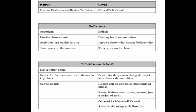So really, if you're choosing between PERT and CPM, it depends whether you want to look at it from the customer's point of view. Customers usually prefer PERT because they want to know start and finish dates — milestones, if you like — or whether you want to look at it from the point of view of the person doing the work, in which case you want to use CPM and focus on the activities to be done.